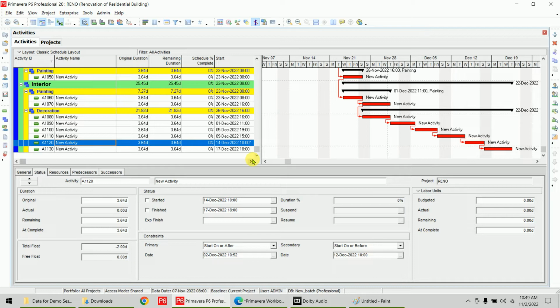If you don't find any type of relationship, with which activity I will attach this one, after which activity I can start this one, but you only have the idea, like after the start of the project, at least after 3 months we have to start. That is the same thing, like if you don't have the expertise, you don't know. But you have a rough idea that after 3 months we can start. If you have this data, you can use the constraint, otherwise you will never use a constraint directly.